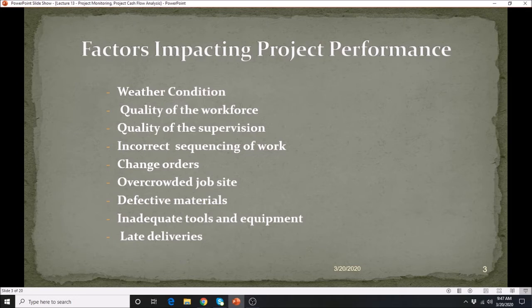If we will be needing them early on in the morning, we might have them delivered in the afternoon a day before. However, there are several restrictions on that one, especially if the project is in a very tight location, such as in a central business district, wherein we don't have much of a laydown area. So we sometimes utilize JIT, as they call it, the just in time.